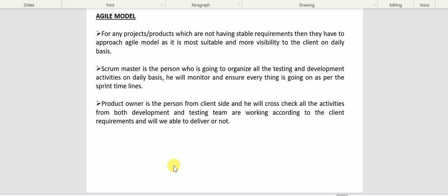Okay, most of the time the sprint duration will be 2 to 4 weeks. They are not expecting the entire application in those 2 to 4 weeks. Even though it is a smaller one, they are expecting some deliverables in those 2 weeks, whatever has the highest business value, the stories or functionalities with the highest business value. That adds more value for the customer. He feels he cannot wait until the end of the year or 2 years for his product. Every 2 weeks something has to be developed, tested, and delivered to the client. That is the value added to the client. One by one, the different features are developed and tested. That is the reason they maintain smaller teams: they can easily manage, and more output comes because it is a self-motivated model.